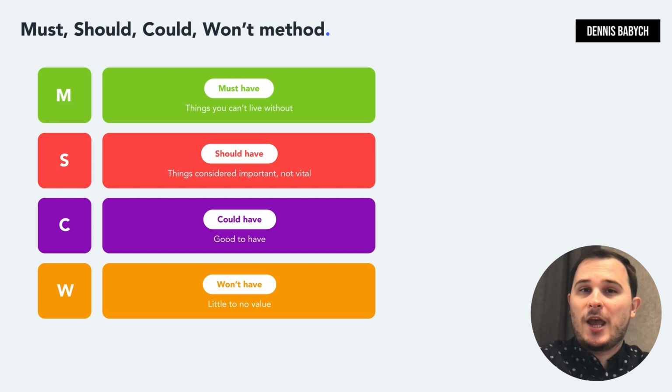Okay, once you have thoroughly researched your competitors, identified all your customers' problems, and generated a range of solutions, it's time to properly prioritize your software features. You will need to decide what features you must, should, could, and won't develop. This methodology effectively creates a framework of key features required for swift development and proper prioritization. On top of that, it helps you to pivot if needed with limited resources. Also, it helps you to identify your prime path and crystallize your project's fundamental goals.